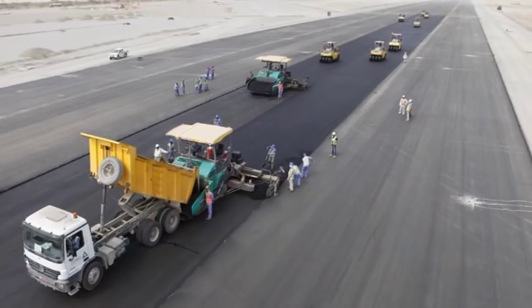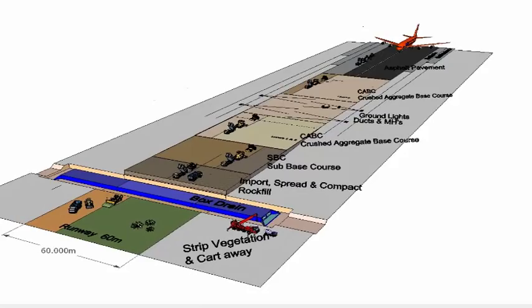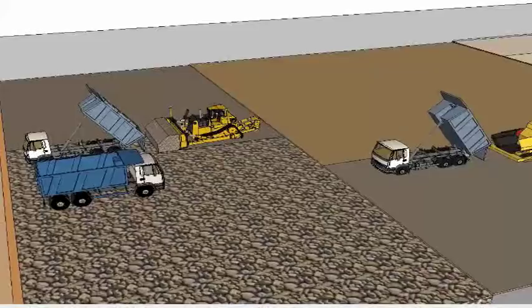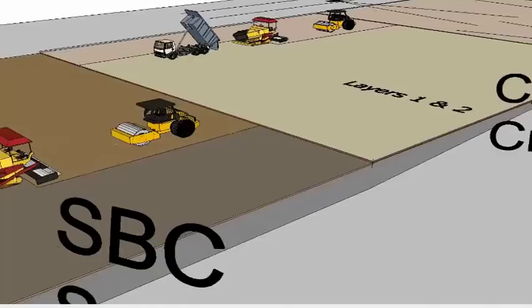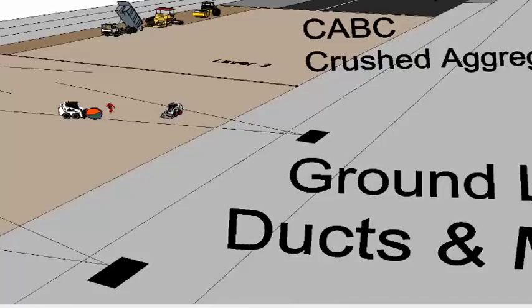Airport Runways. The asphalt mixture is laid with two tracked pavers equipped with extending screeds, tamper, vibrators, auger, and conveyor. The pavers work in echelon, in a staggered formation, producing a 15-meter wide mat. Level control is maintained by two string lines as a grade reference system for the lead paver, and a matching shoe and one string line for the following paver. The pavers operate using an automatic screed control, which controls the screed height using the string line or the matching shoe as a level and line reference.